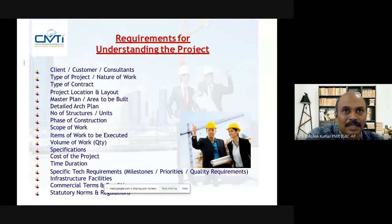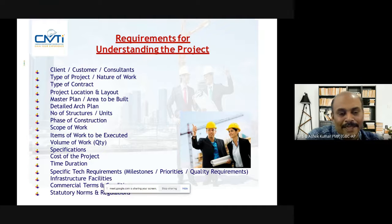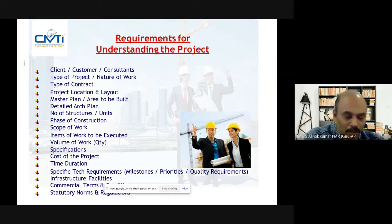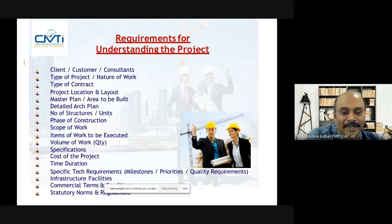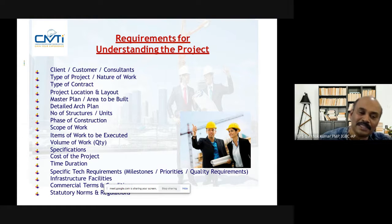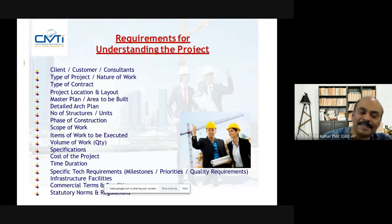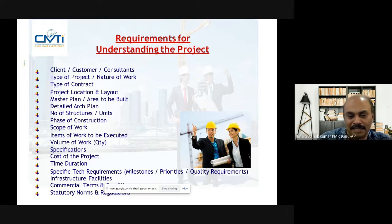If you are going as a fresher to a project, you are not going to do time duration calculations. You will be in a position where somebody has already prepared the schedule and you will be monitoring that. After gaining some experience — maybe three or four years — you will do it by your experience. Duration calculation is very critical and needs experience. Regarding milestones: what is the milestone — it is nothing but stage-wise payments, which work has to be completed when, and priorities. In some projects, the client may say 'I want this tower to be completed first.' Those priorities have to be captured in the schedule.